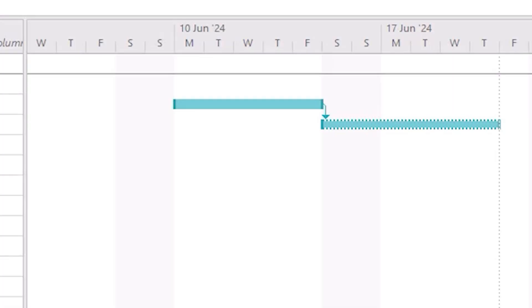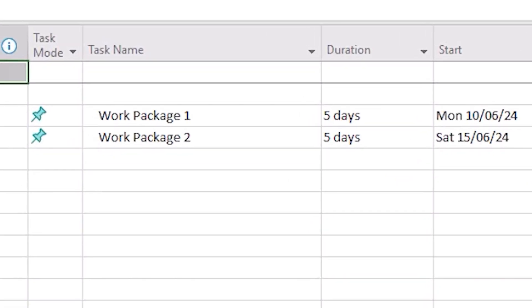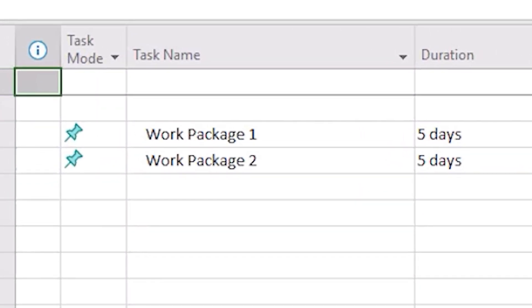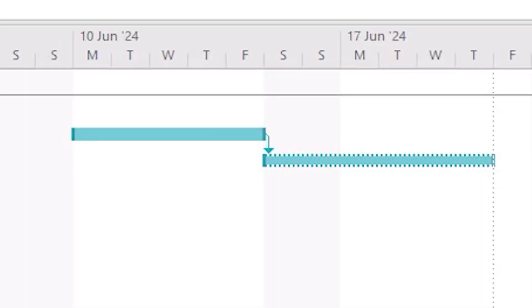Let's fix an error. These tasks have been linked by dependency with the second task called Work Package 2, set to start as soon as the first task ends. But these are manually scheduled tasks. You can tell because of these icons in the task mode column and the colour of the taskbar itself. Manually scheduling gives the user great control over the project dates, but in my opinion tends to be more useful when you're working from known fixed dates that will not move. But it can lead to some problems.